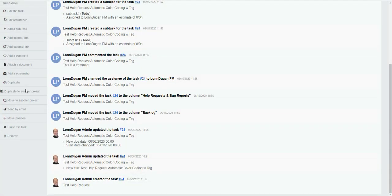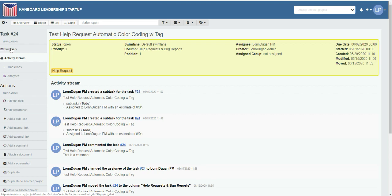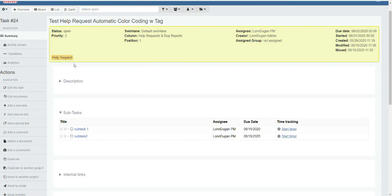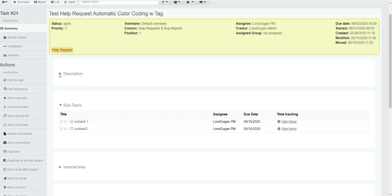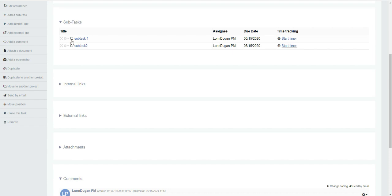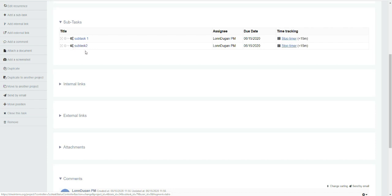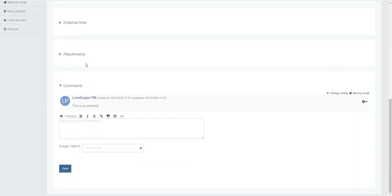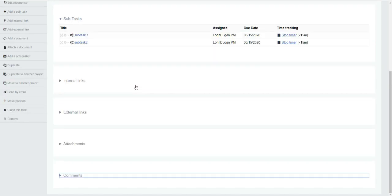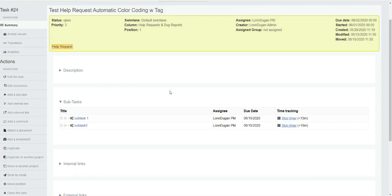Now if we look at the summary, we'll see that we have a project, a task — no description was entered yet on this one — but we do have subtasks. When you click your subtask links, you're going to see that the timer starts at the right: time tracking. That's one way to keep track of how much time you've spent on something. You can also see the comment put in a little earlier. Note that the time tracking did start when I clicked those links on the left, so I want to stop the timer.